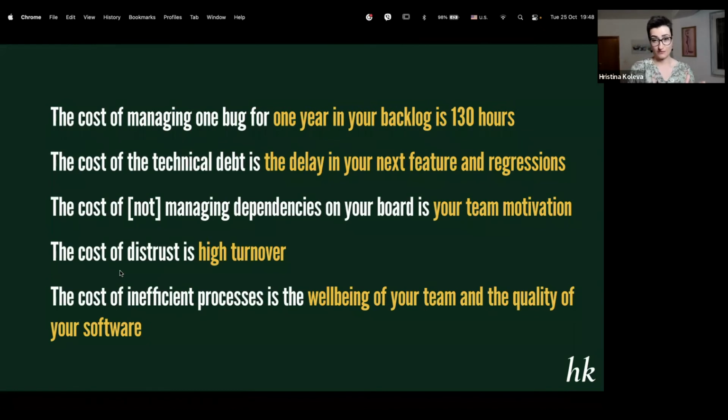The backlog is an operational list used for short-term management. It should be very clean, and what it contains should be the absolute certain priorities that we're going to work on. These items could be one sentence, not refined or described at all, but it should be clear that they are the next priorities. Like 10 of them, for example. Actually, 10 is a lot. Less than 10 items in the backlog.